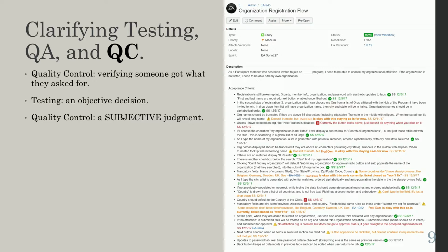Quick question on that. Say you're testing something and there are very specific test instructions, and you see something that would be orange, that is, okay, this is not in the parameters. Would you say this is a stopper of this ticket, or would you create a new ticket on that? That is also very based on the team. Originally, it depended on how bad it was, but if it actually crossed the line into a bug, I would leave it as is, demo it as is, and create a new bug based on that so it didn't stop progression. If it was a bad enough bug that I thought it going to production was going to cause problems, I'd stop the whole story here. So it just really depends.